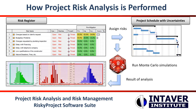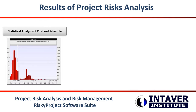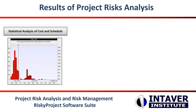The results of the analysis are a statistical distribution of project cost, finish time, and other project parameters, as well as ranking risks in the risk register. After running the Monte Carlo project risk analysis, there are three main outputs. The first is the statistical analysis of cost and schedule, provided in the form of histograms or probability charts, and cumulative probability plots or S-curves.